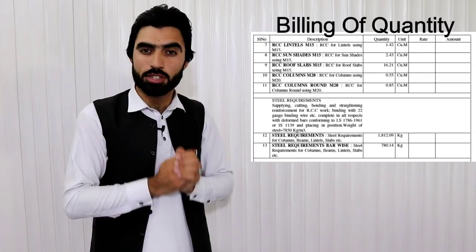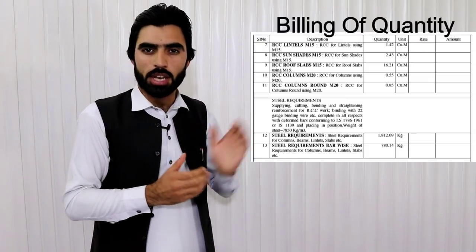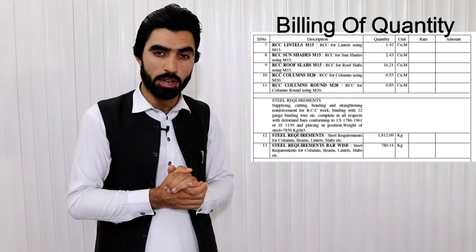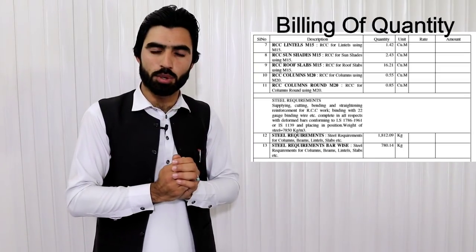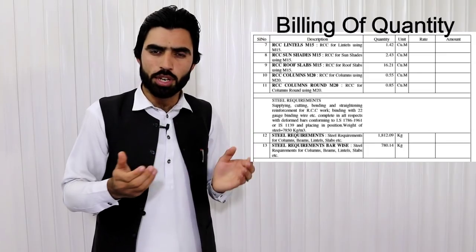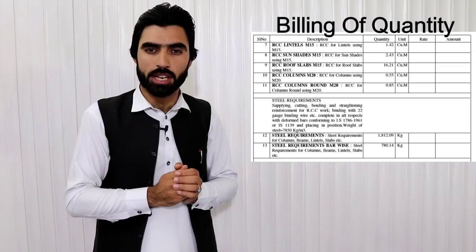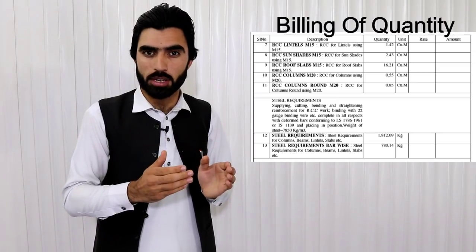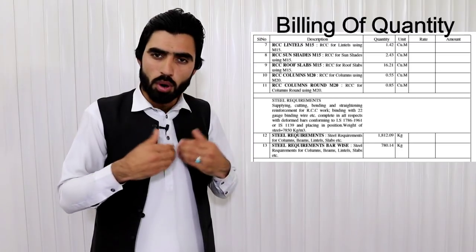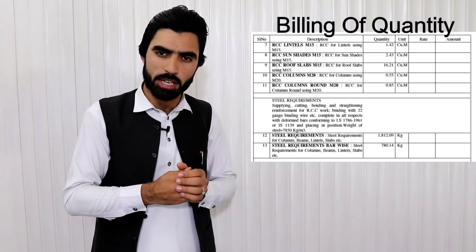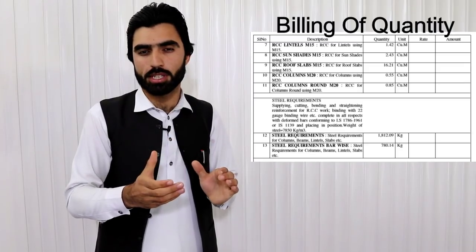You can see now on the screen — this is the list of BOQ, Bill of Quantities. The first column is the serial number. The second column is specification, where you can write the full details and full specification of any item used in building construction work, especially for brick, cement, steel, wood, and all materials used in building construction works.